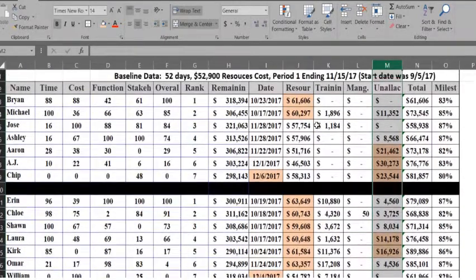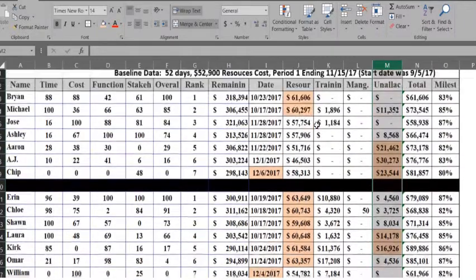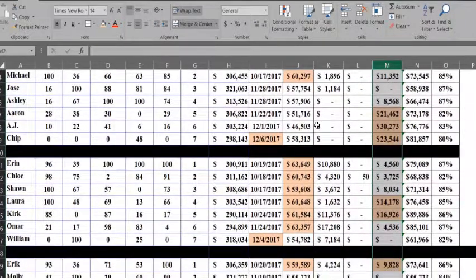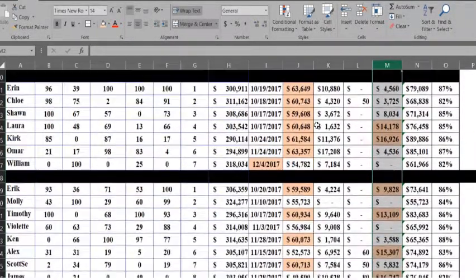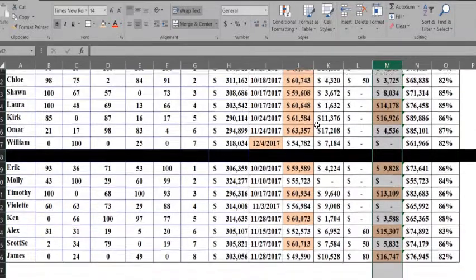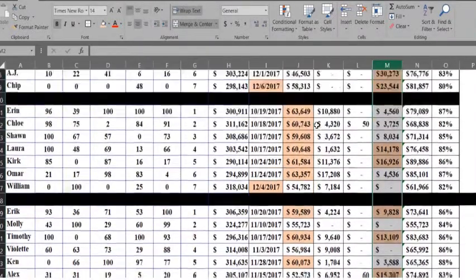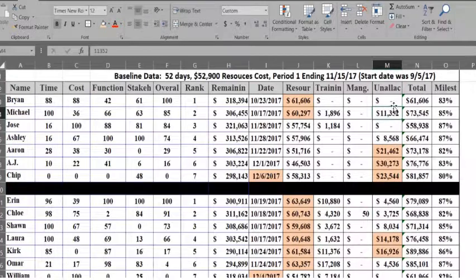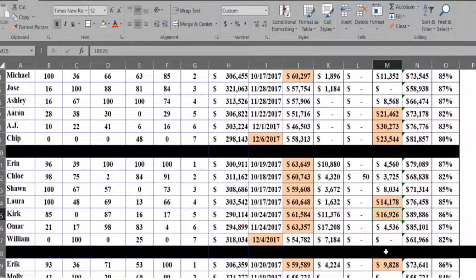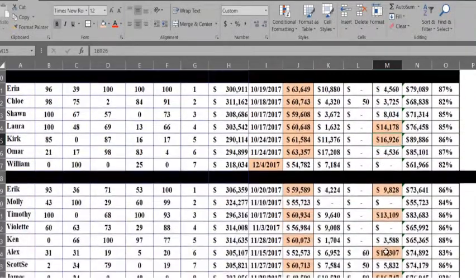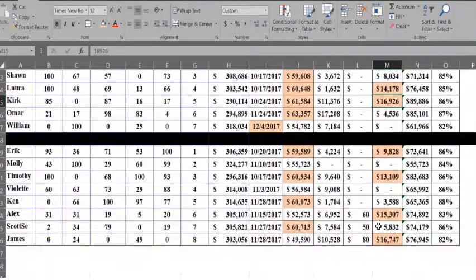Again, you were given a fully loaded team that clearly you don't need everyone. So having huge charges there means you didn't fire people and you paid for them. So this probably won't happen in the team-based simulation, but at the same time, this is really an indication of how to manage your resources. And clearly, folks with high charges here aren't quite understanding the fact that your teams need to be lean, otherwise they cost you. So that's just something to be aware of for about half the teams there with high charges.